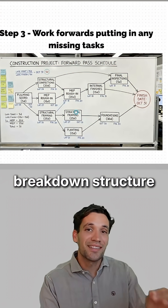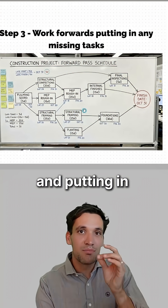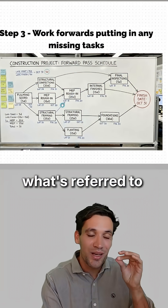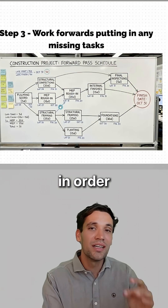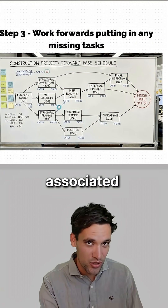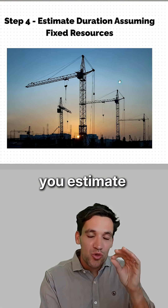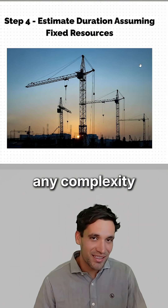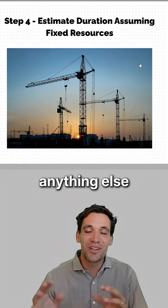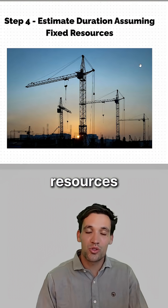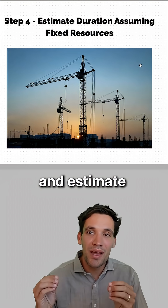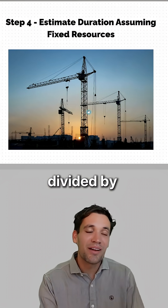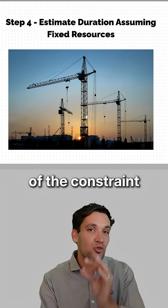You then go through your work breakdown structure working forwards, putting in all the missing tasks so all tasks are captured in what's referred to as a network schedule — all tasks are in order, but without durations yet. The next step is to estimate duration, assuming fixed reasonable resources. Don't get into any complexity about resource linkages — just assume reasonable resources, what you're most likely to have on the project, and estimate the durations.